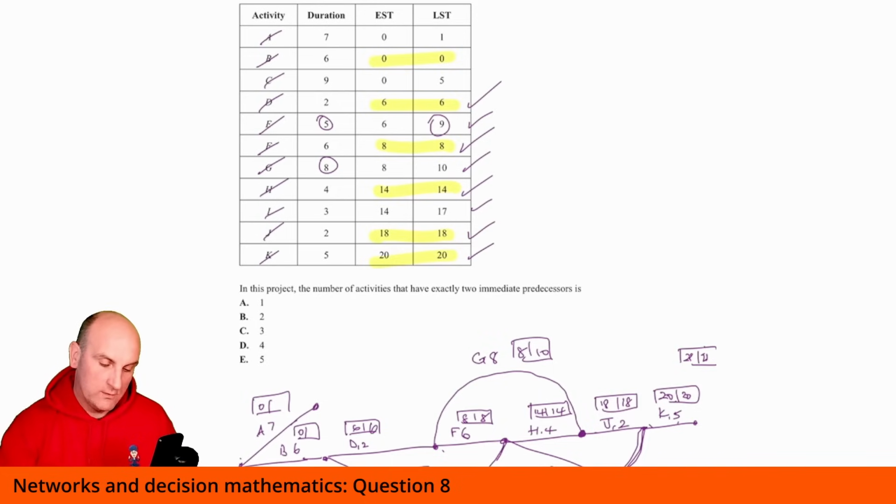And then we've got to work out C. Latest start time is 5. So something minus 9 has got to give me that 5, so that's 14. It's got to connect into where there's a 14. No, what am I trying to do? I'm trying to do C. Yep, so that's actually got to connect into here, I think. Yeah, because 14 minus 9 gives me 5.